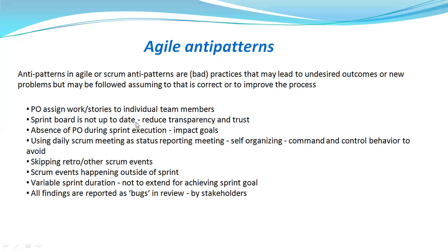Even some people update just before the daily Scrum call. For example, if you're having a daily Scrum call at 5 p.m. in the evening, then at 4:55 they do the update, but actually that is not the right way. So as a coach, the Scrum Master should make sure the team understands the importance of this particular activity.